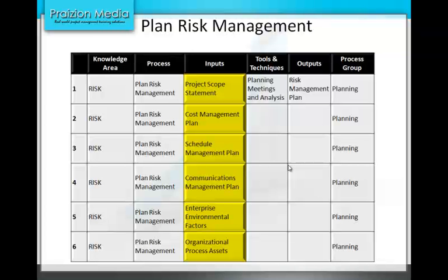If it does and it's negative, well, you've got management reserves hopefully for that. Now, if something that you are expecting to happen happens, but you've put aside a contingency reserve for it, then use the contingency. The project manager has the authority most of the time to use the contingency reserve. It's the management reserve that you need to get permission for.